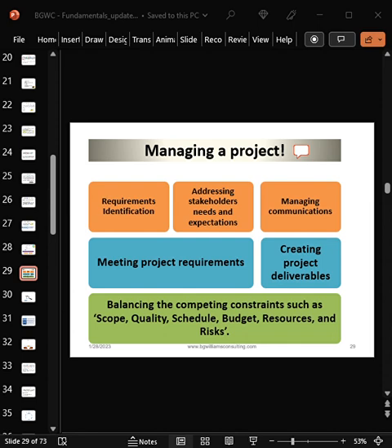Embarking on this project, it will need us to get two additional resources. It will need us to buy more material. Buying more material and getting additional resources will definitely add to the cost. And also, sir, we will not be able to finish at that agreed timeline, but if we want to do this, maybe we'll add 2 extra weeks or 1 extra month to achieve that. Oh, sir, it will need us to get approval and licenses, taking an extra 5 months. That is what we are saying.